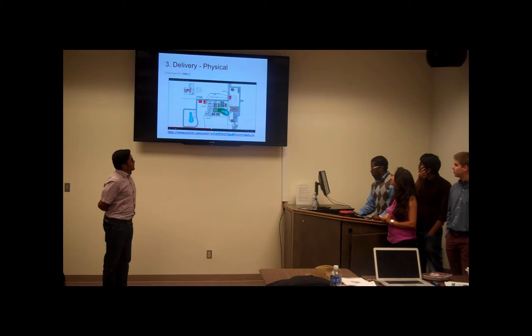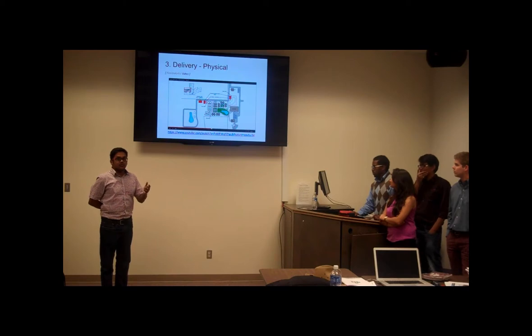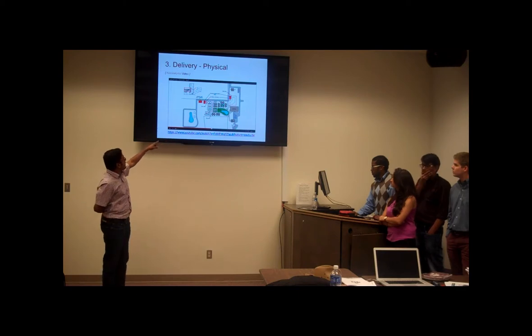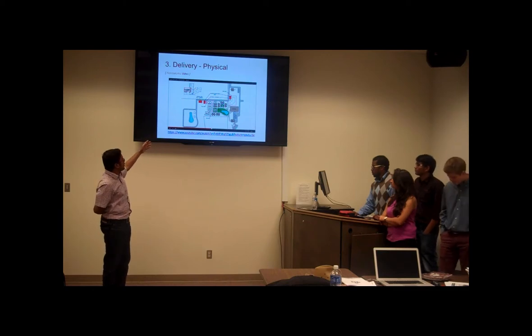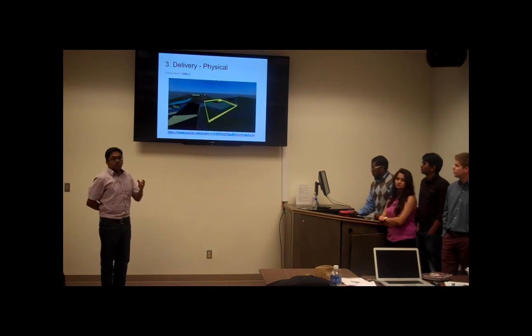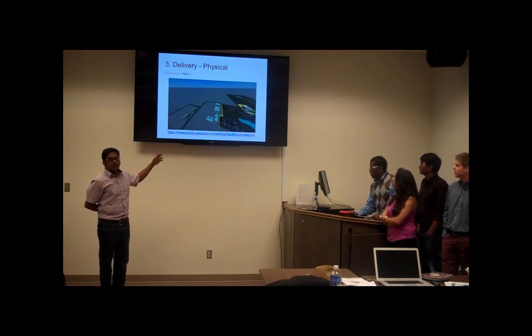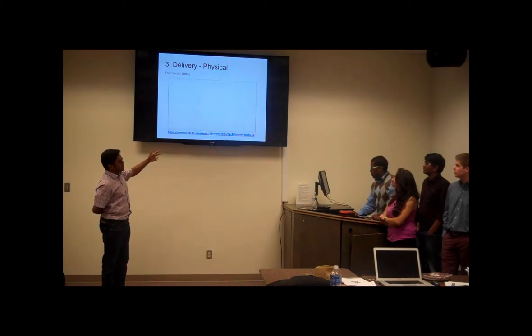One of the challenges in our second phase is that we have to build the facility without disrupting the existing function of the school. So we have used the periphery road above, where you can see the construction site access would be happening, and the highlighted areas are the site mobilization, including trailers, material drop-off and all. In the second phase, the recreation block of the school will be coming up, which is segregated to minimize the disruption of the school functioning. And there will be 5 units of housing coming in the second phase. And you can see the fencing was given so as not to disrupt the school functions.